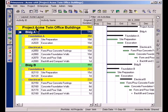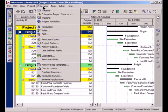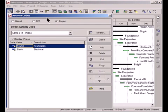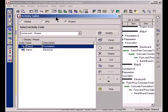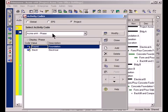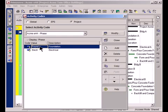I'm now going to go and create some activity codes that we're going to assign to all of these activities. To create the activity codes, I'm going to go to the Enterprise menu and go down to Activity Codes. Now you can see here I'm going to create project activity codes and I actually already have one created. This activity code is called Phase and Phase is broken out by two categories.